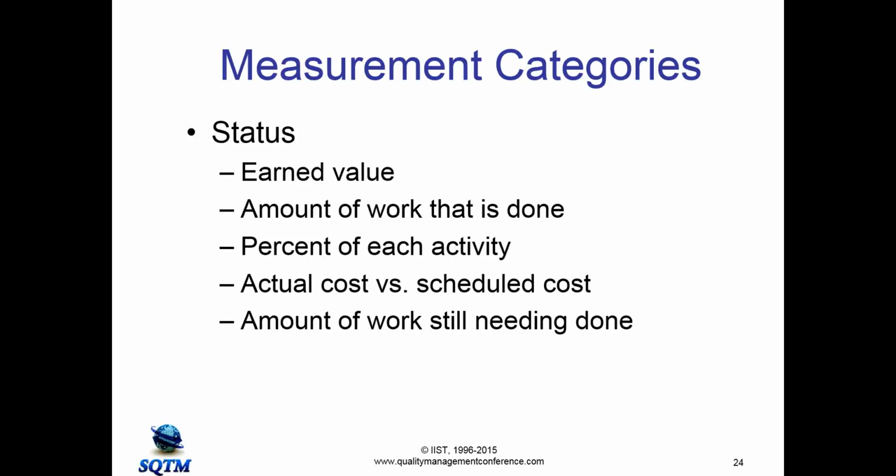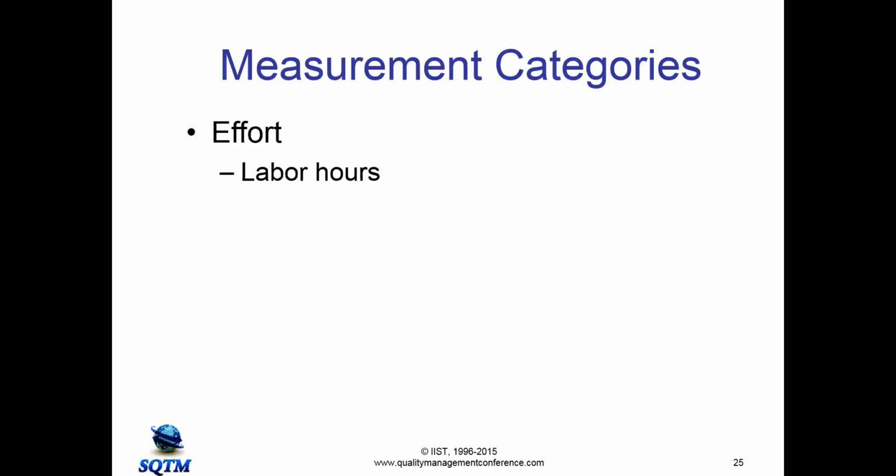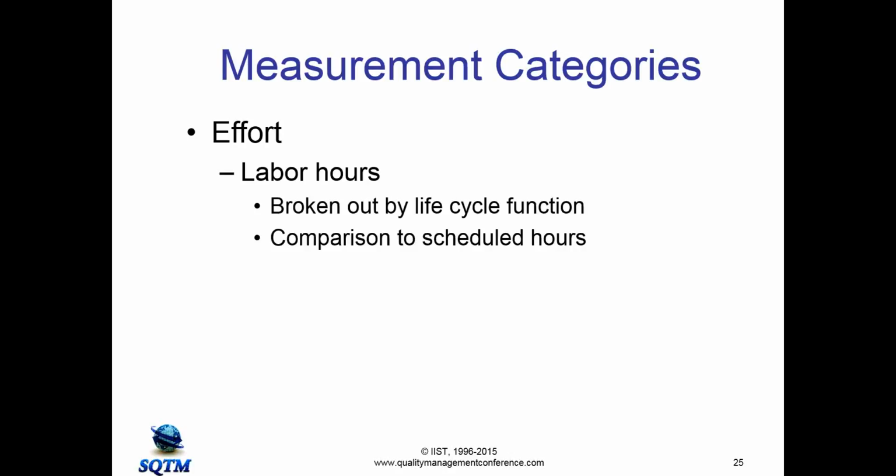Do you have enough time to do all of this remaining work? So you need to correlate the data back and forth to look at it. Effort. This is labor hours. Remember I said you can equate labor hours into dollars. So labor hours broken out by life cycle function in comparison to the scheduled hours.